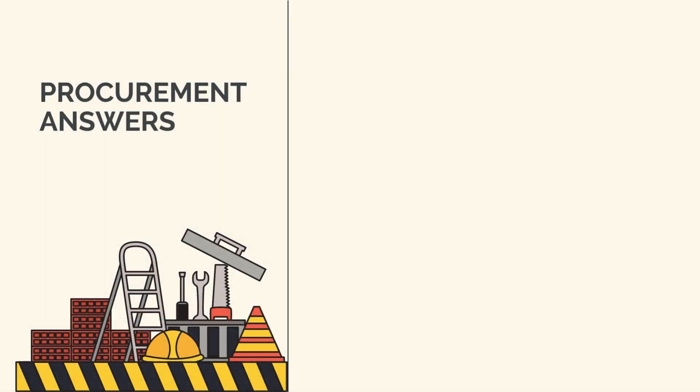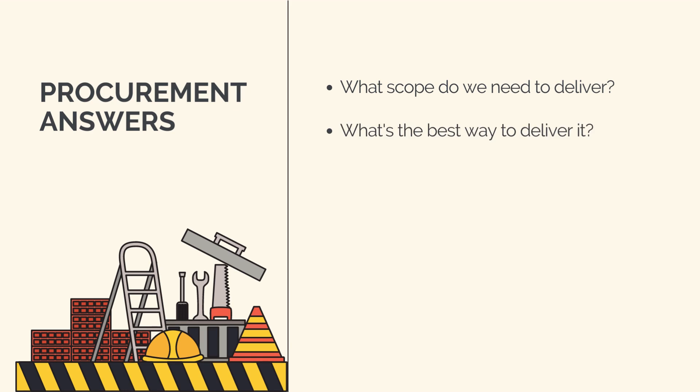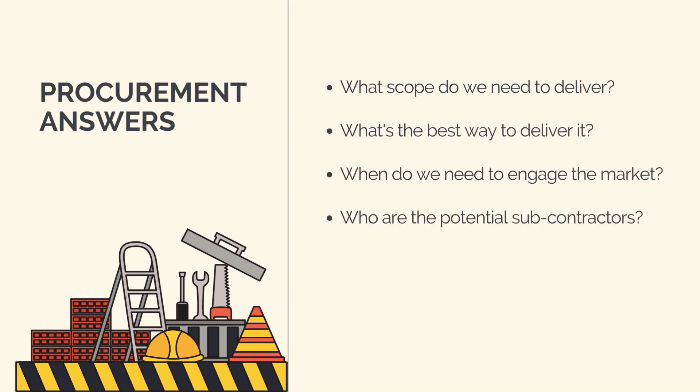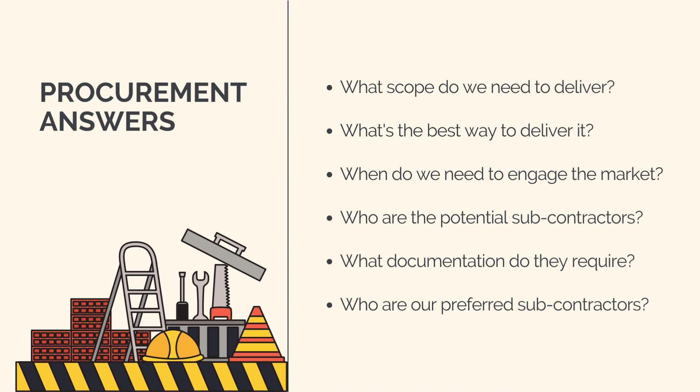Through the procurement process, we answer the following questions: What scope do we need to deliver? What's the best way to deliver it? When do we need to engage the market and run tenders? Who are the potential subcontractors and suppliers we can use to deliver the works? What information do they require to accurately provide us a quote? And once they've provided their quote and delivery methodology, who are our preferred subcontractors and suppliers?